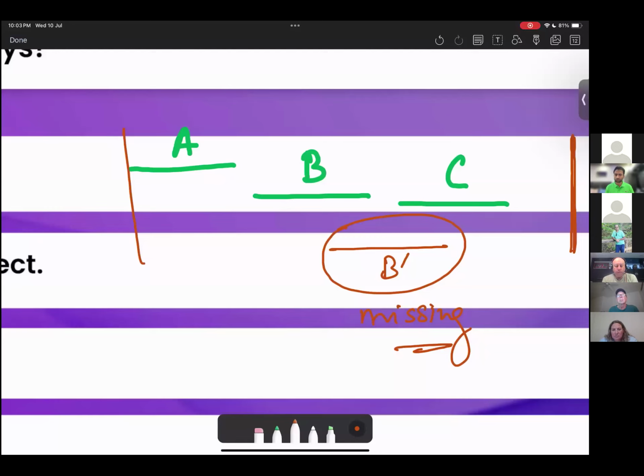When you raise a change request, you don't just incorporate that change, you take care of all the aspects. What would be the impact on schedule? What would be the impact on cost? Is there any adjustment needed in resources? So yes, you will be having more resources to minimize the delay. However, in order to have additional resources, you need to raise a change request.